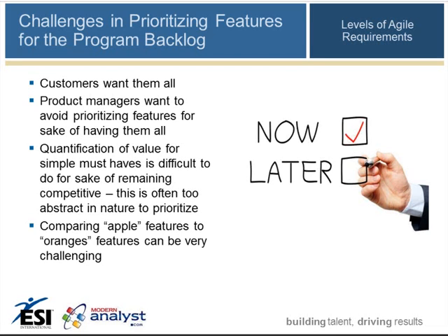So there's always a trade-off, and the quantification of value has to be made. In some form or another, a collaborative approach to defining the most important and prioritizing those against the less important, stack ranking them, is going to have to happen. And lastly, comparing certain features to one another can be pretty challenging. So sometimes that has to be moved up a notch and be defined in terms of business value, and the customer has to serve a role via the product owner or executives even in breaking the ties.